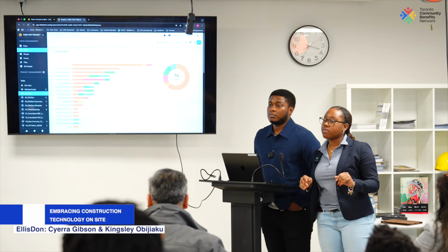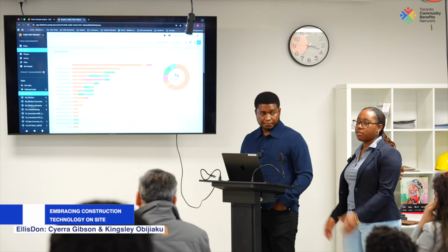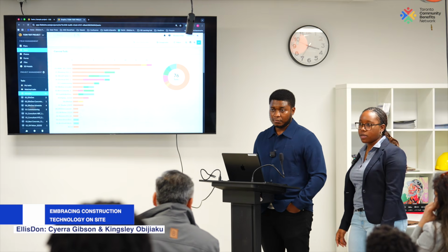Yeah, I just wanted to comment on what he said. I think the reason why PDFs are issued and not the actual file has something to do with intellectual property. There might be information that's being withheld because it's probably not for the contractor, and that's probably one of the reasons. And secondly, in terms of the label, she's correct. But at the same time, that's the reason why there's an RFI process to clarify the assumptions made, and that's where you do the bid analysis and leveling. Yeah, I really like that point that you brought up about intellectual property as well.